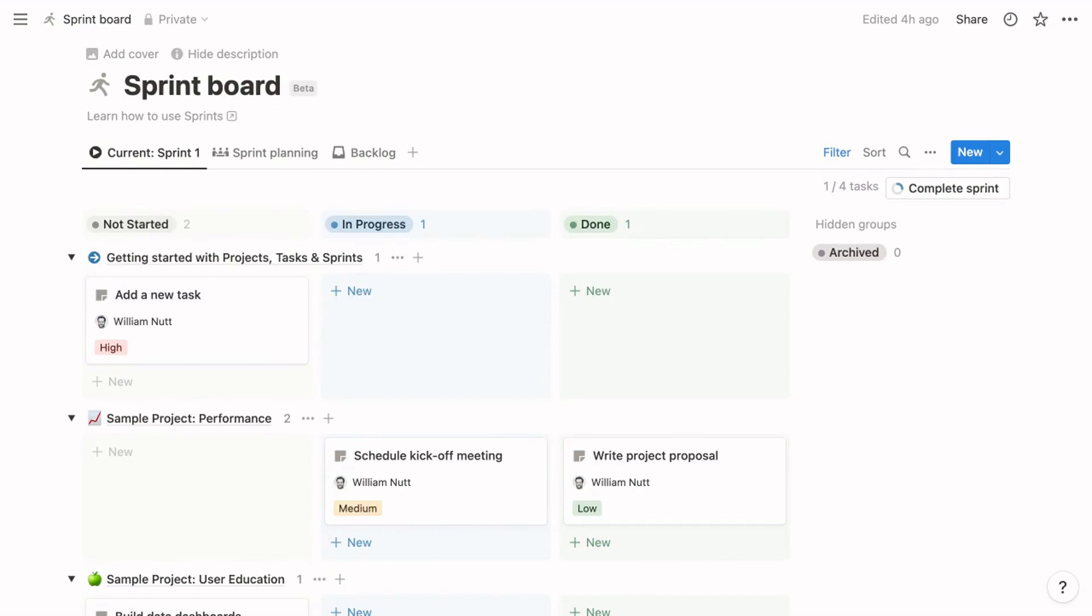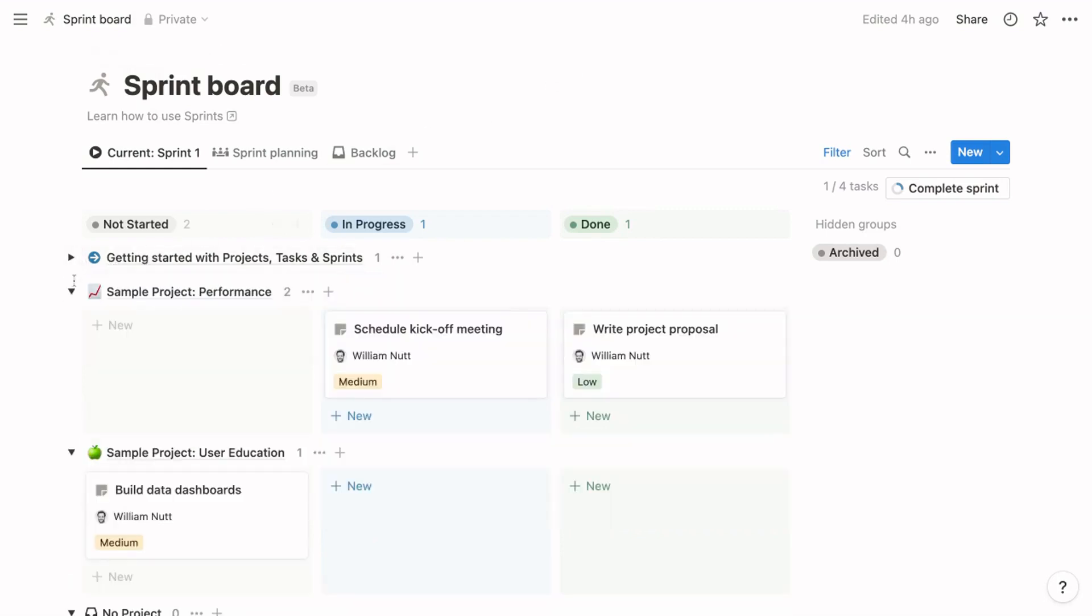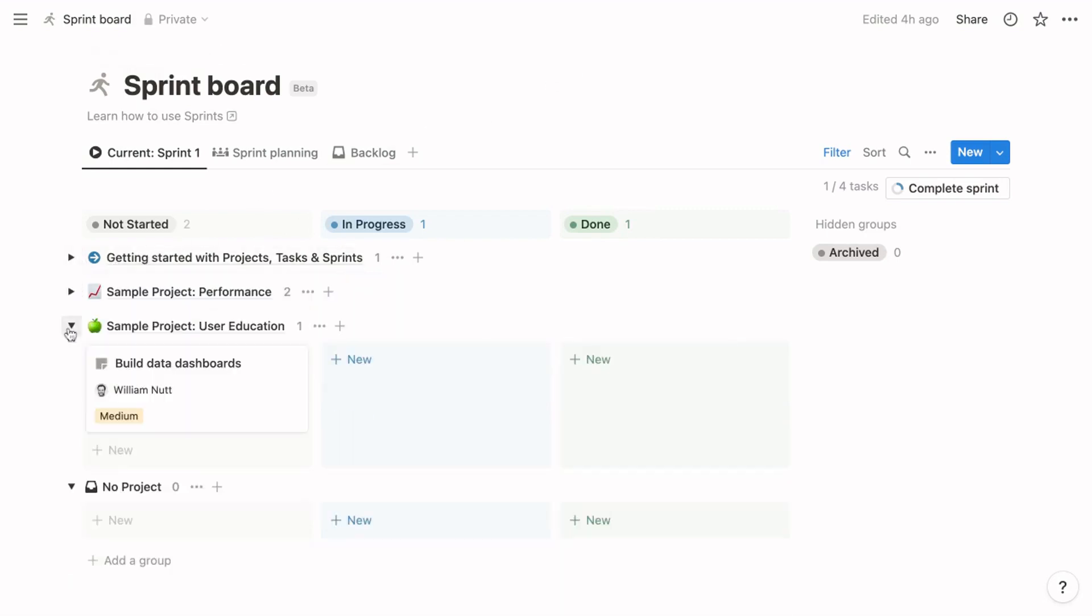The first view is really the one that's most notable. It displays tasks for the current sprint, and the name of the view dynamically includes the name of that current sprint. It's a board layout and groups tasks by status—those are the columns. Then it subgroups them by projects—those are the toggles.